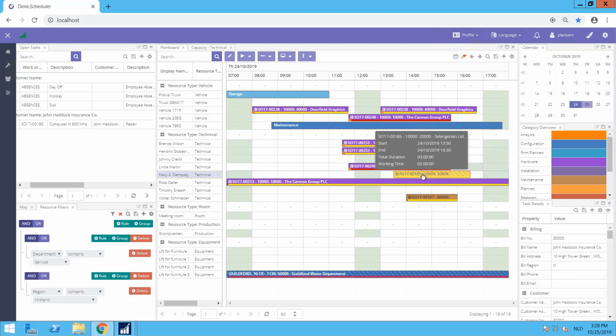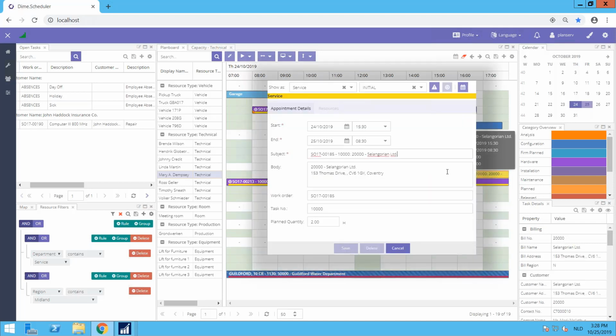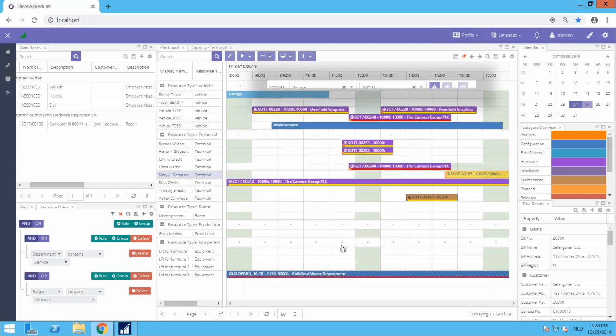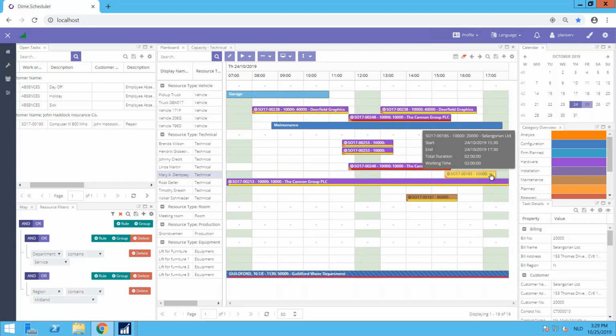But if you're on a Friday night and you have 15 minutes left on a job, and you have been traveling 3 hours to go to that job, what you don't want is this happening. You don't want it to create an additional half an hour the next day or after the weekend, in which case you could say, right, for this specific job, I will ignore the calendar, and you will see it will allow me to do that half an hour of overtime just to make sure that I have done the job in time. So this is just something small that we've added.